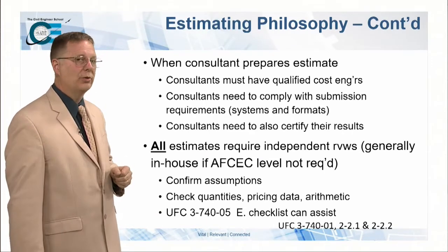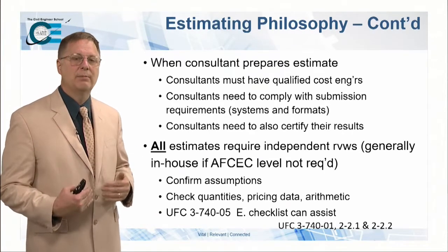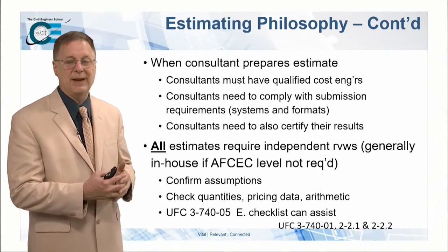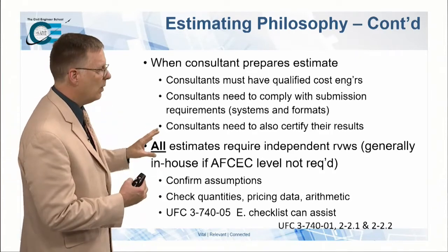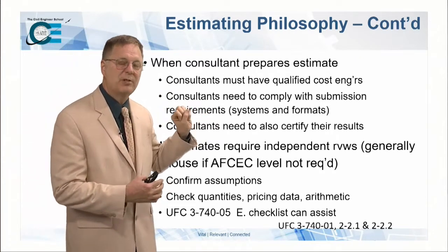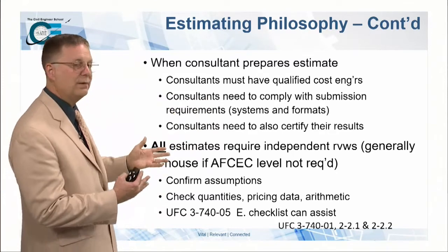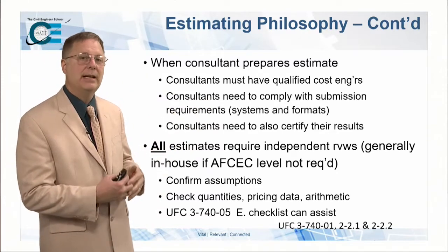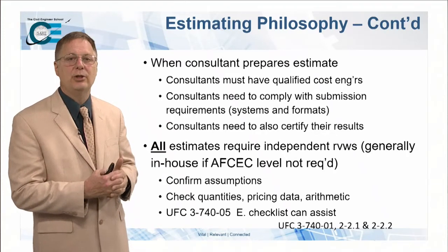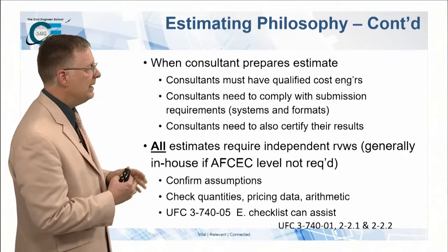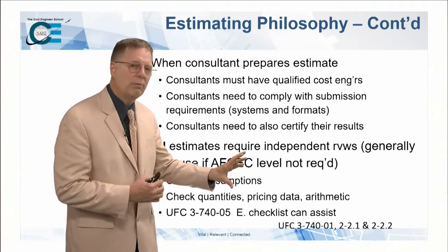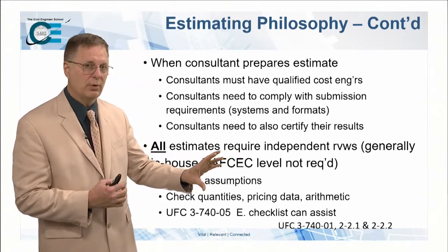If you have a consultant prepare that estimate, we have a responsibility to review that estimate and validate those results. But likewise, you should also be expecting your consultants to have qualified estimators on their staff. And that should be part of the criteria that you use to select those consultants. In the end, all estimates require independent review and approvals.